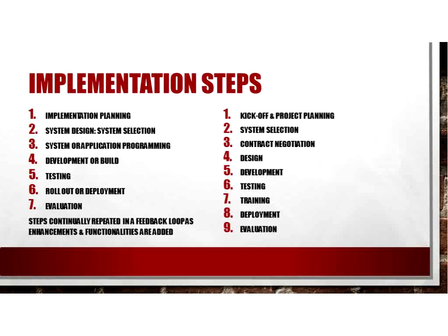Then 8, you have deployment. You prepare the system site, go live, and roll out that system for production in a production environment. And 9, you want to evaluate. You want to test and validate that system after you go live. Make sure everything is working the way we desire, and take those results of that evaluation and issues identified back in an organized process to work and resolve those.